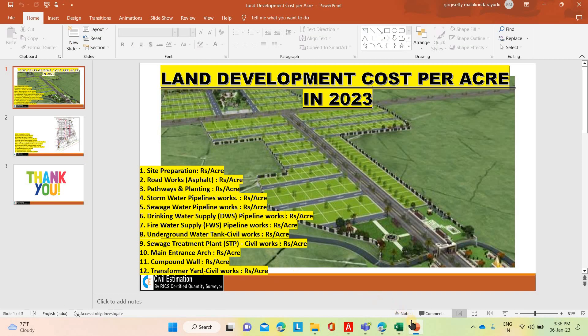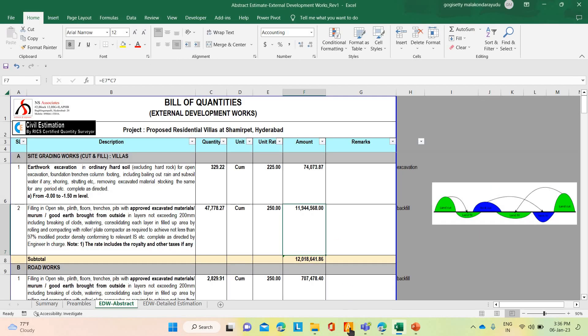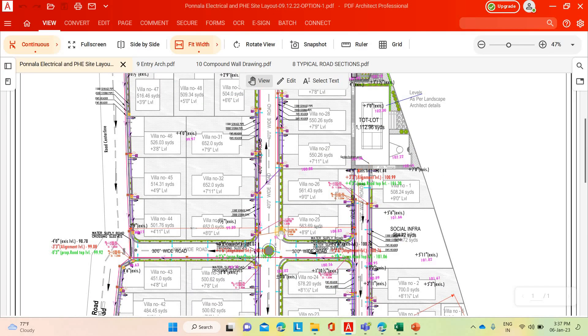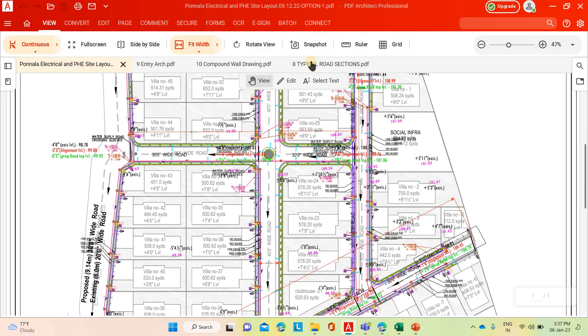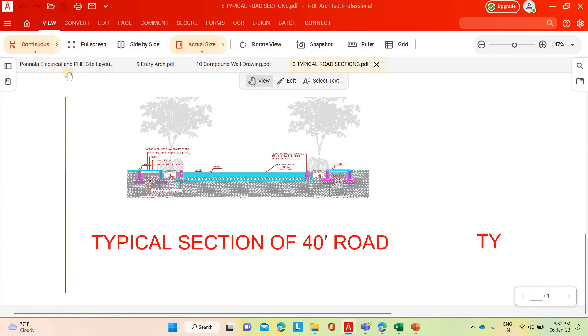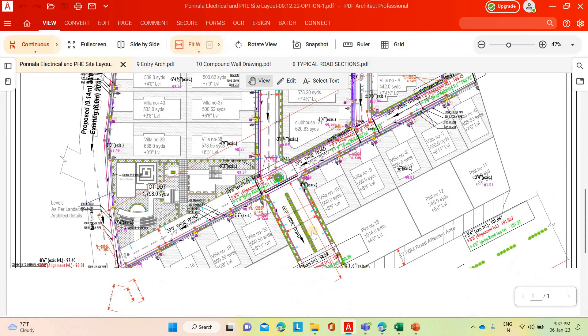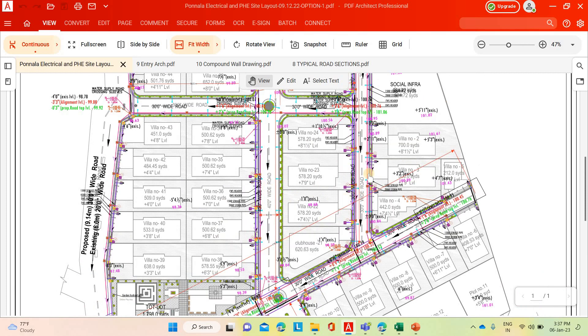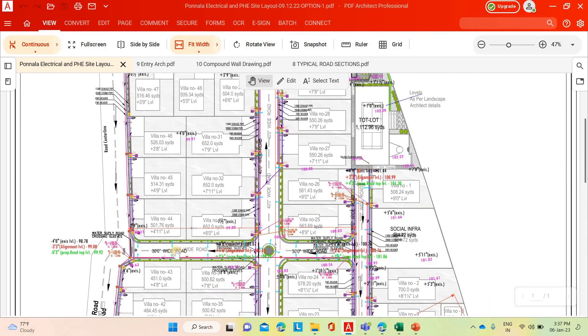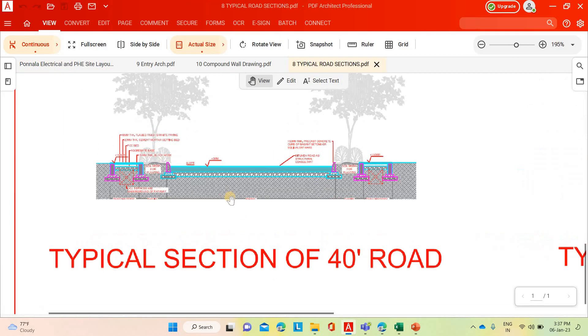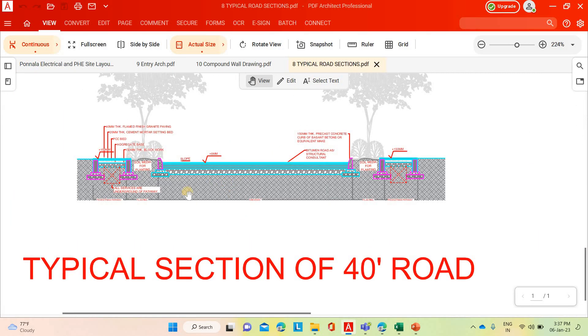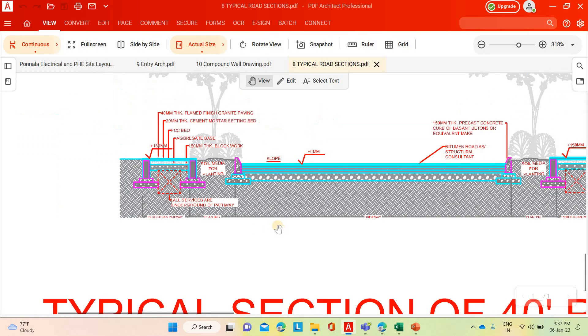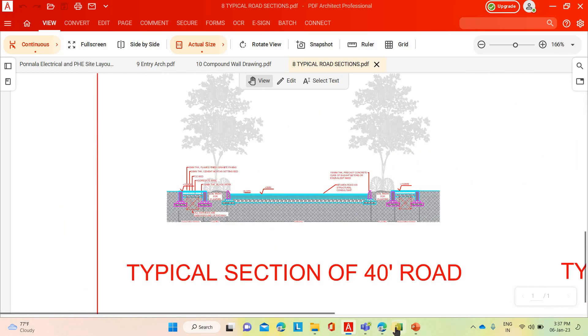Then road works. Based on the HMDA layout, architect will prepare the complete road layout and give the road cross section and details also. In this layout, we are having three types of roads. This is 60 feet wide road, then 30 feet road, then 40 feet road. Each road has given typical cross section. The center is the carriageway and left and right both immediate sides are the landscaping area and extreme sides are footpath. Under the footpath, it is the service area. In that service area, we will take all underground services like electrical cables, stormwater line, drainage line and water supply lines. Based on this, we need to prepare the road works.